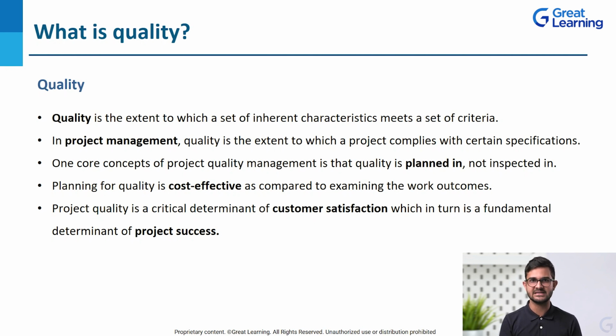Let me give you a very simple example. Let's just assume that we are working on a project right now, and you do not plan for quality. You have no idea how you are going to manage the quality, plan the quality, or assure the quality in that particular project. Let's say it's a construction project. Then eventually, once everything is done and the project is ending, we'll realize that we actually have to go for rework maybe because the quality was not good enough. And quality is extremely important in certain industries such as the construction industry or maybe in other industries as well. So we'll have to go for rework, and that will not be a very cost effective method. Maybe we'll have to repeat the entire work and it will be a wastage of money, time, energy and effort.